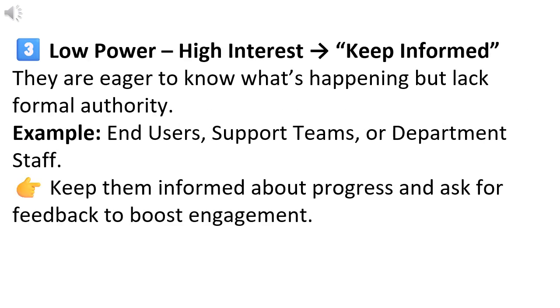3. Low power, high interest: keep informed. They are eager to know what's happening but lack formal authority. Example: end users, support teams, or department staff. Keep them informed about progress and ask for feedback to boost engagement.